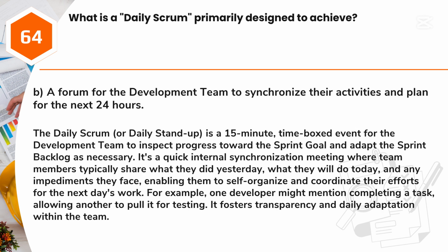Answer: B. A forum for the development team to synchronize their activities and plan for the next 24 hours. The Daily Scrum or Daily Stand-Up is a 15-minute, time-boxed event for the development team to inspect progress toward the sprint goal and adapt the sprint backlog as necessary.